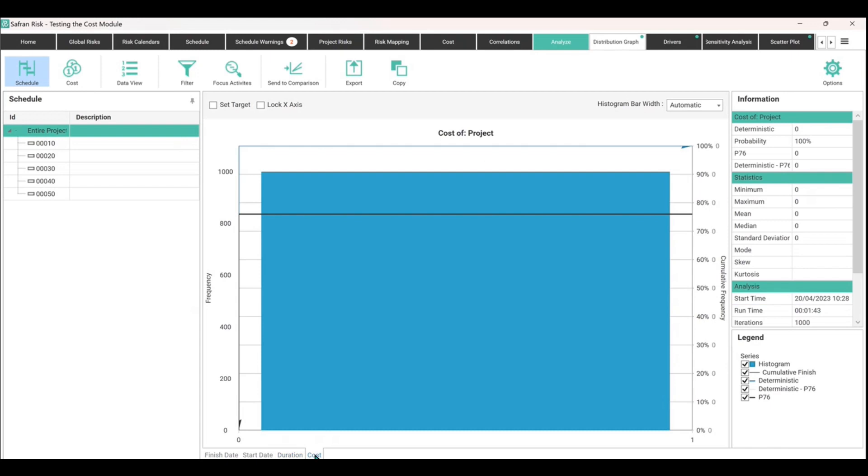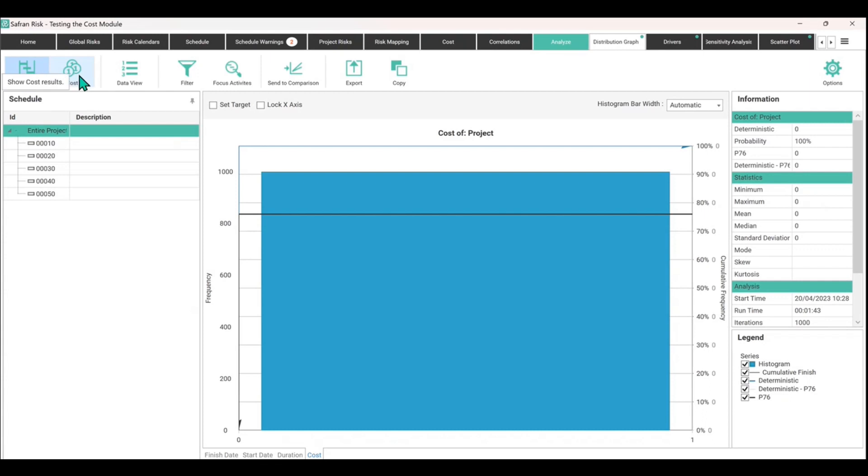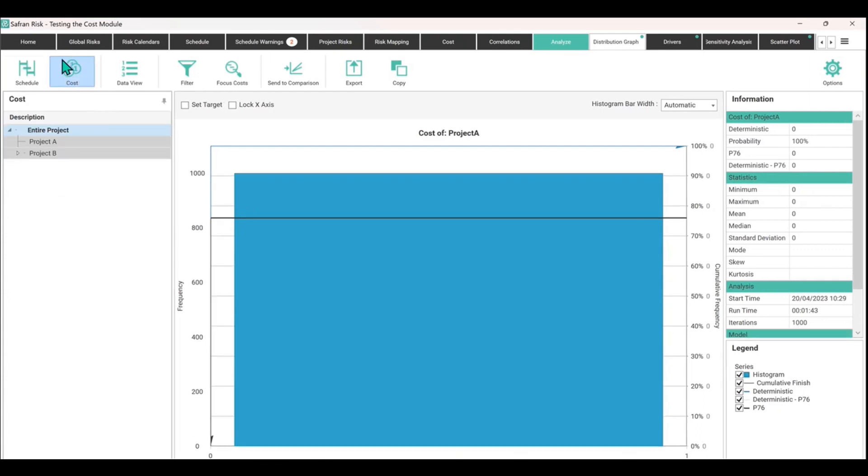I'm pointing this out just for the purpose of clarity and avoidance of doubt. This cost down here on the schedule output is for a resource loaded schedule and resource loaded cost and any intervening risks from the risk register that may have been added, whereas what we're interested in here today is the cost.